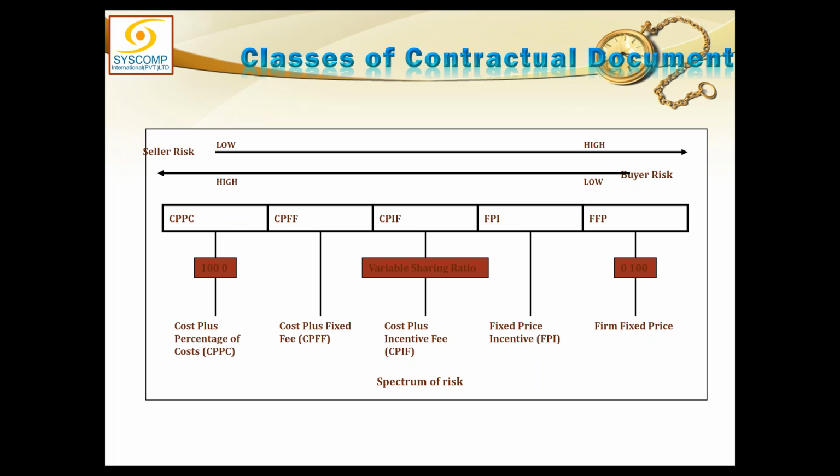In this type of contract, we do agree on a fixed price, just like in firm fixed price, but as a buyer, I ask the contractor that if you do this job earlier, I will give you an incentive. Earlier you do it, more you get. So I fix a percentage or an amount that per day saving would give him this much incentive.